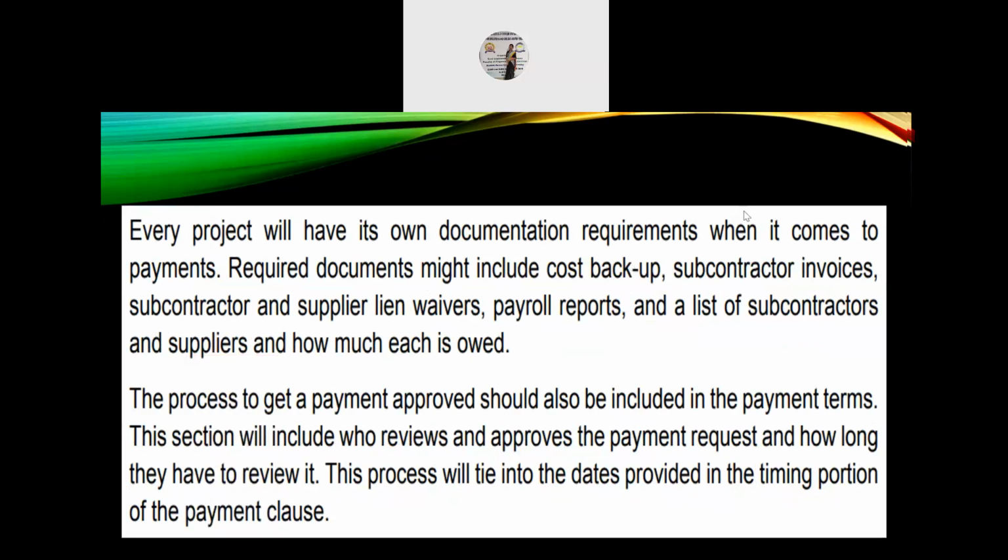Every project will have its own documentation requirements when it comes to payments. So required documents might include cost backup, subcontractor invoices, subcontractor and supplier lien waivers, payroll reports, and a list of subcontractors and suppliers and how much each is owed.